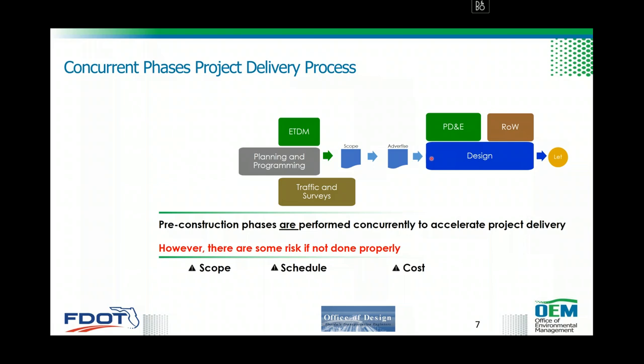Under these contracts, PD&E and design will be performed concurrently to accelerate project delivery. However, following this process, there are risks you should be aware of — risks related to scope, schedule, and cost. If you do not scope it well, you're probably not going to be successful. The schedule — how you'll line up activities to support NEPA approval as well as design plans — and costs are all tied together. If you don't do well on scope and schedule, you'll ultimately have cost issues.